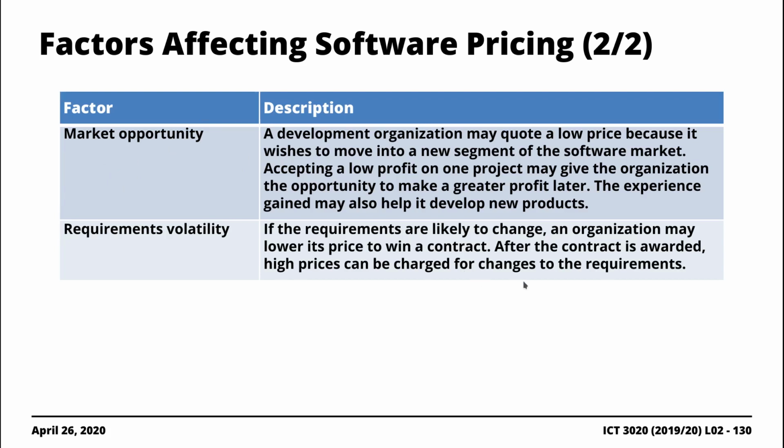The idea behind this is that requirements are more likely to change, and so you might want to lower your price just so you can win a contract in the event that you are undergoing a bidding process where you're competing with other development companies or firms. But once the contract is awarded, you'd obviously adjust the price depending on whether you have new requirements coming in from your clients or customers.